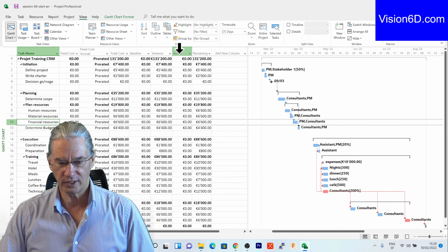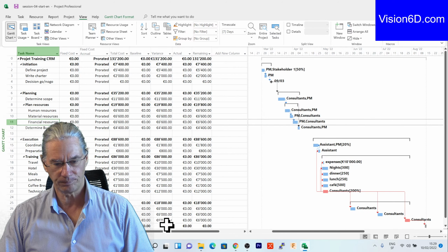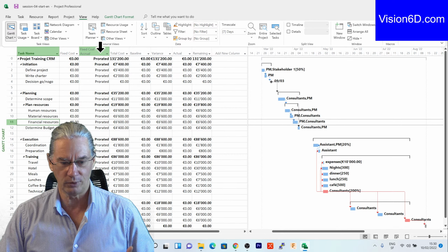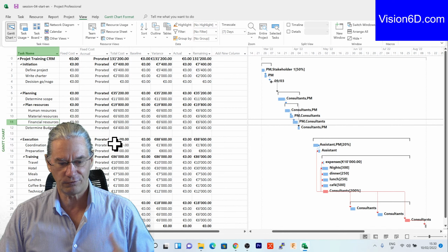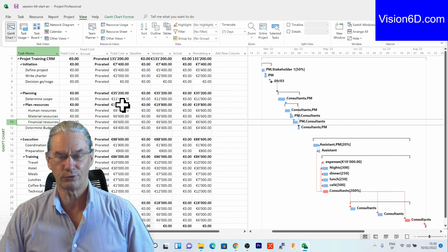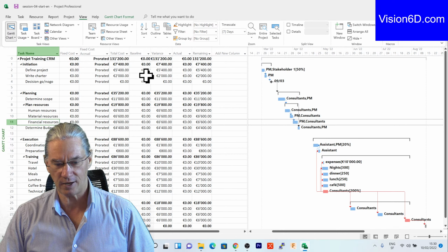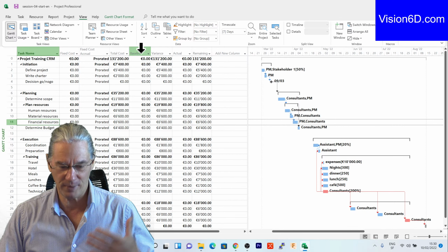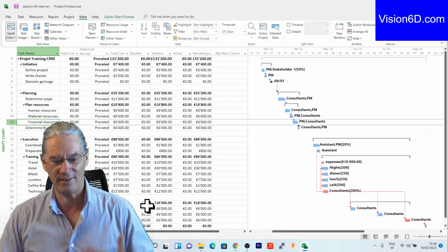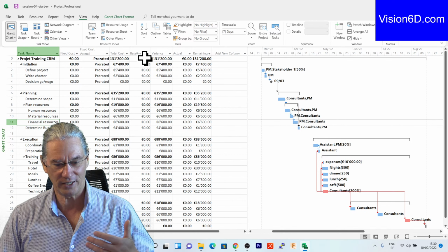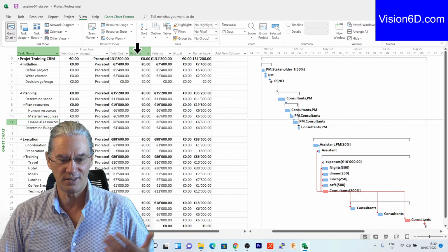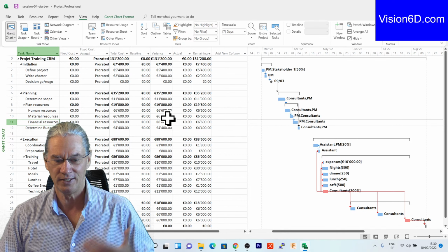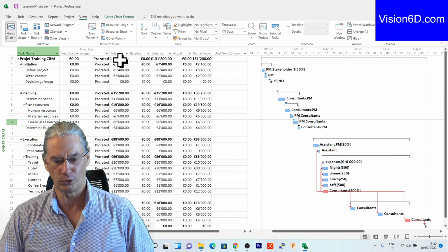We can also take a look at the cost table. You see, the cost table is interesting at that stage because that table defines the total cost for the project, but also for all the different tasks, and then it comes with variances and the baseline cost. Actually, we haven't baselined the project, so there isn't anything. The variance is the difference between the total cost and the baseline, and for the moment, since we haven't started, it's the same value as the total cost.